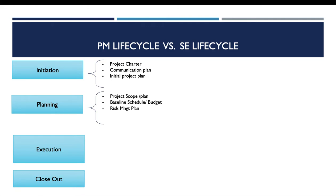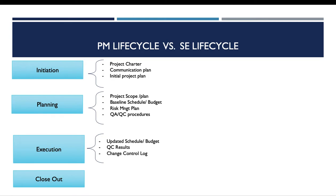The planning phase also delivers a detailed risk management plan and a quality control procedure. For the execution phase, the main deliverables are an updated schedule and budget, quality control results, and change control logs.